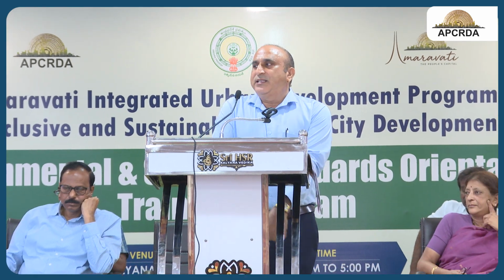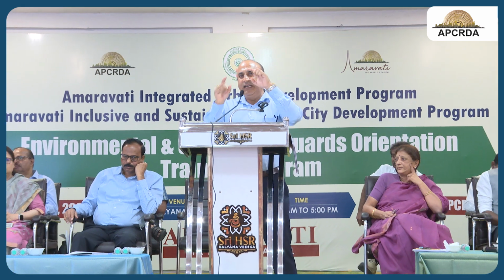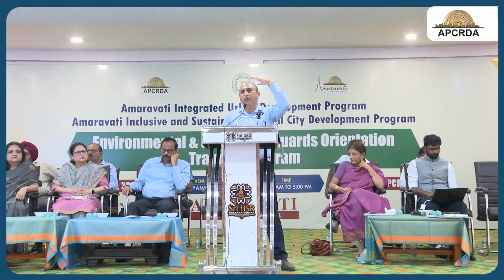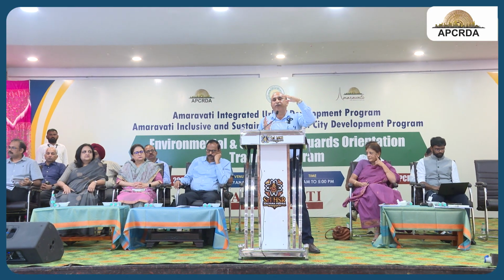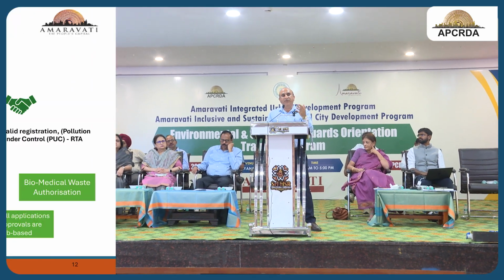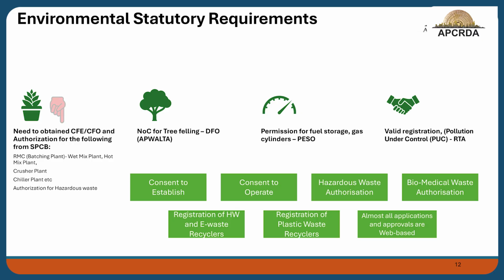Yeah, environment statutory clearance, like we just spoke about. First is EC, which we need to take for the project activity. Once we get an EC, we need to take consent from the State Pollution Control Board, or the Andhra Pradesh Pollution Control Board or respective state, which is the consent to establishment. We call it CFE, and then consent to operate. Before execution of any project activity, even before laying down our material, we need to take a consent to establishment. Once it is done, we go for a consent to operate, which is given for 7 to 14 years, depending on the complexities of the project activity we are dealing with.